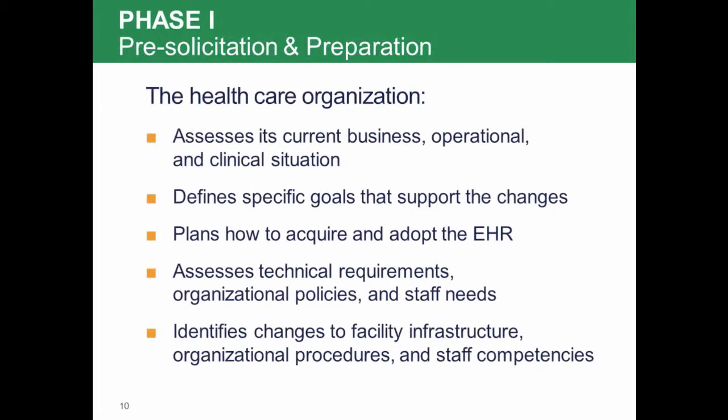Your leadership team could include individuals with the following roles: an executive member that has the authority to make final decisions, a clinical champion who can facilitate clinician "buy-in," and an EHR project manager with the responsibility for coordinating tasks. Smaller practices may not have separate individuals in each of these roles. However, these functions should be delegated to an individual or to a consultant to ensure a successful EHR procurement process.